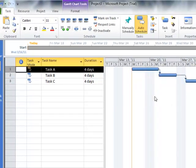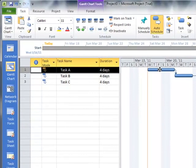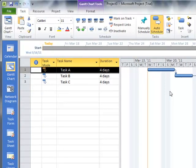You will notice that this particular task takes four days, but you notice that it spans the Saturday and Sunday, and Microsoft Project knows that Saturday and Sunday are non-working times.